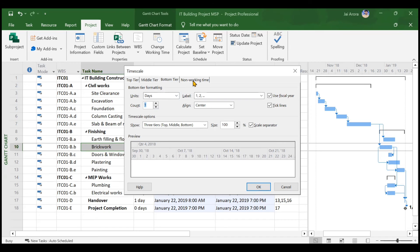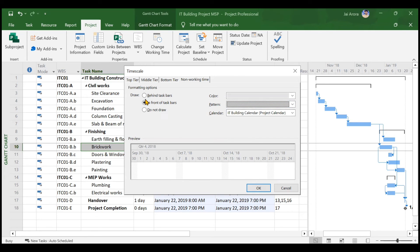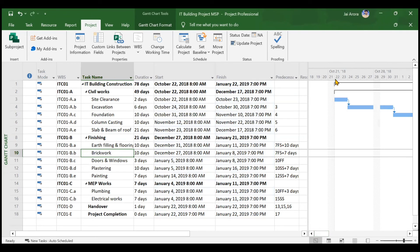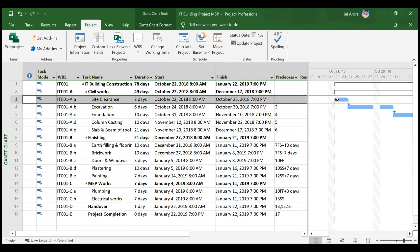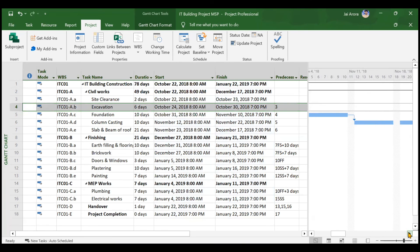To also show non-working time, choose the calendar as IT Building Calendar, select a pattern and color — for example, gray — for non-working days, and place it in front of the task bar. When you click OK, the Gantt chart updates. You can see site clearance starting on 22nd, ending on 23rd, then the next activity running to 27th, followed by 28th October which is a Sunday and shown in gray as a non-working day.